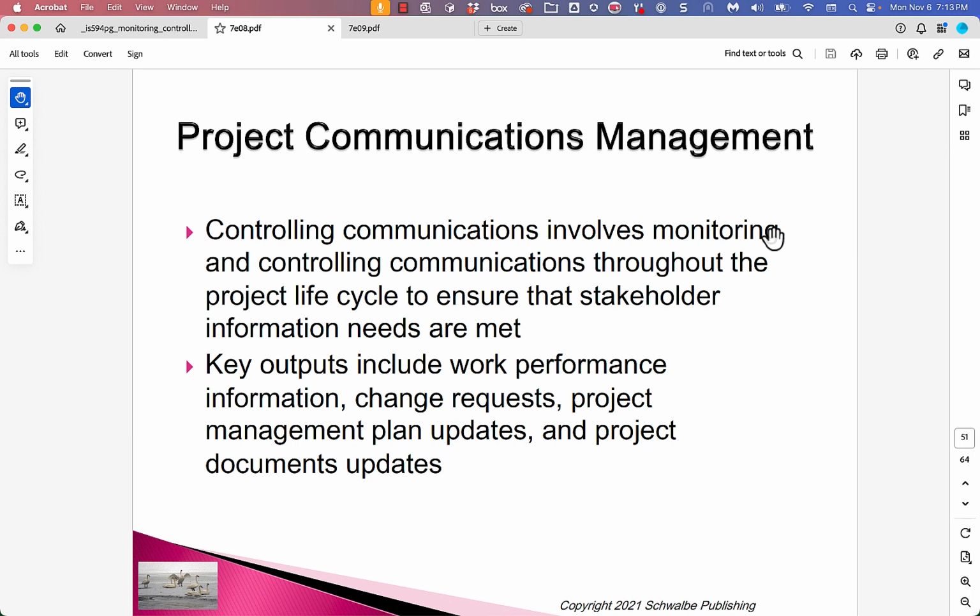I think that's one of the reasons that a lot of organizations have gone to these dashboards. So you turn your project into a red light and you get people's attention. But it's incumbent upon the project manager to make sure that people who are supposed to know the status of the project are reading the reports. And then one of the things they could do in terms of managing the stakeholders is to ask them what they thought about the last report. Why don't we walk through it? Really check if people are actually reading this stuff.